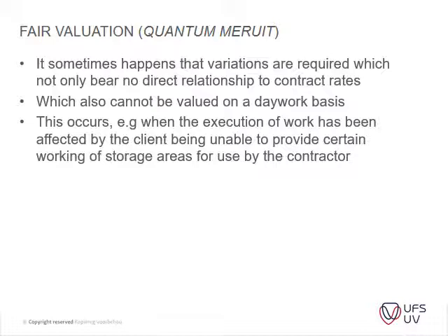For instance, if certain circumstances on site, now the contractor has to incur additional costs to secure the site. It was said in the tender briefing that the site would be secured, and now the contractor arrives on site and sees that there is no security on site. Now he has to get a security guard, he has to fence off the site, etc.